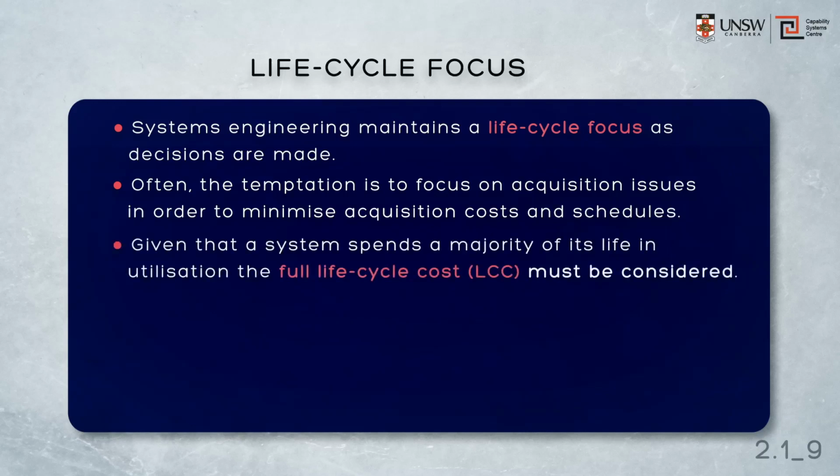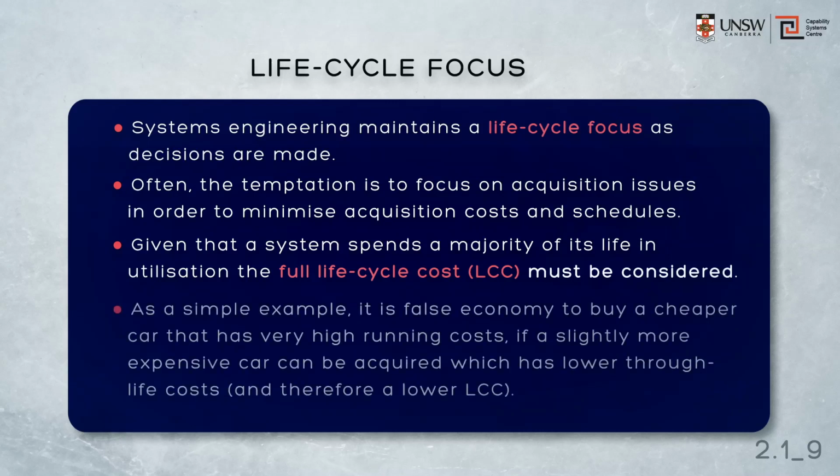A lifecycle focus requires us to focus then on the entire capability over its entire lifecycle, not just the product during acquisition. The result is a focus on what's called lifecycle costs, or whole-of-life costs, and sometimes called the cost of ownership. As a very simple example, it's false economy to buy a cheaper car that has very high running costs, particularly if a slightly more expensive car can be acquired with much lower running costs, and therefore a much lower life cycle cost or a much lower total cost of ownership.